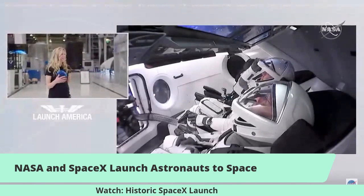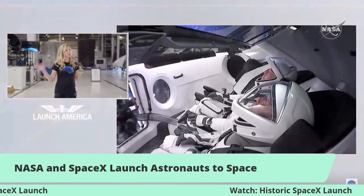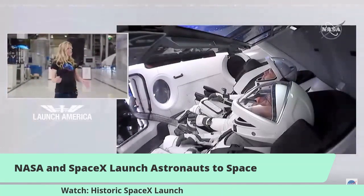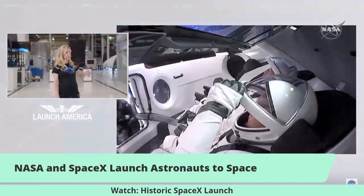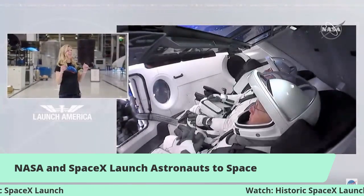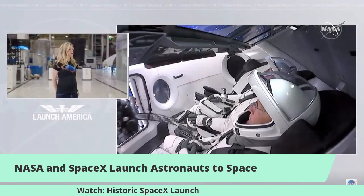It looked almost done. It looks a little empty right now, but that's because that capsule went off into our separate test facility for its final propulsion checks. So we do leak checks and things there, and we do that in a separate facility just because it's high pressure testing. And then the vehicle will come back here, get its final thermal protection system put on, and then it will ship off to Cape Canaveral and get ready to launch 4 astronauts to the International Space Station.